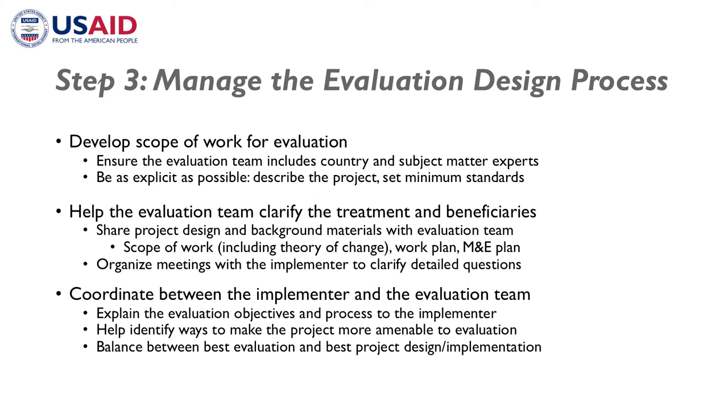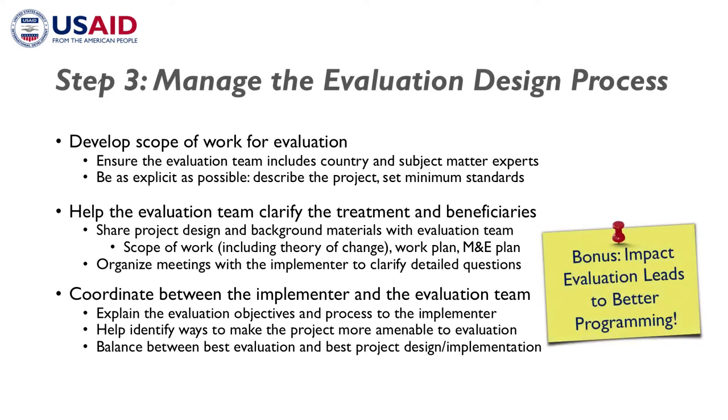Are we going to go with what's best for the evaluation in this case, or what's best for the implementation? And one thing I want to highlight here is that we found that the process of designing impact evaluations actually makes our programming better. In fact, the World Bank has just done research looking at their portfolio that found that projects that had impact evaluations consistently delivered more on schedule and more of their targeted performance indicators than projects that didn't have impact evaluations.